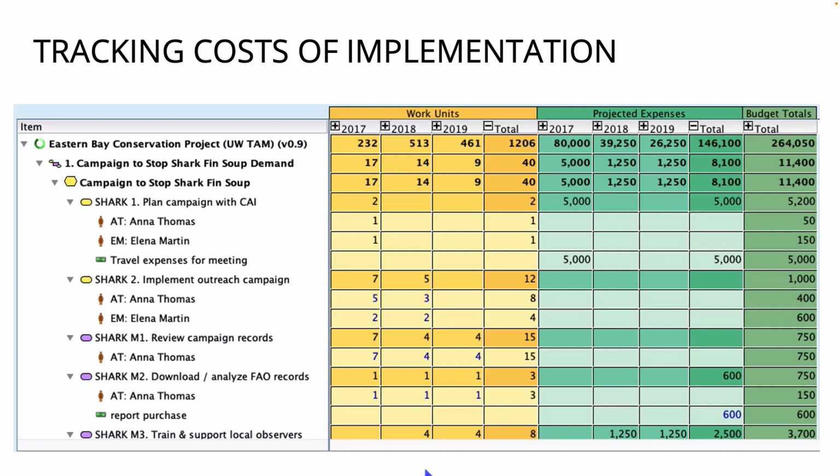Many organizations have an existing chart of accounts that they use to track staff time and other expenditures within their financial system. Often, however, these systems tend to code activities by standard accounting categories, such as staff time, consultant time, facilities, equipment, travel, etc., rather than by the specific implementation and monitoring activities that we can see here in your Marathi file. So you may need to work with your accounting colleagues to develop additional or substitute accounting codes that better link to your project activities.